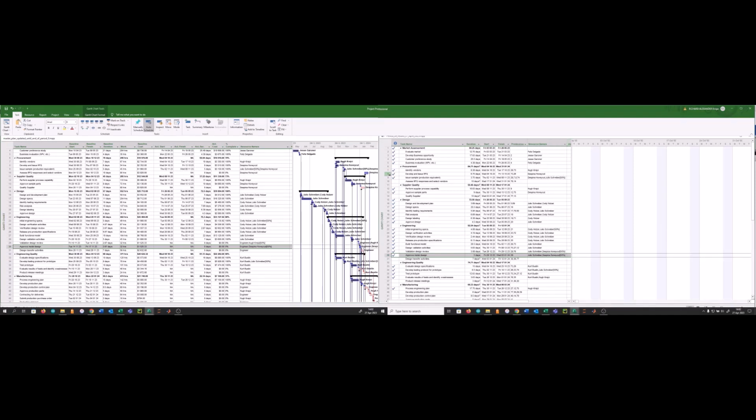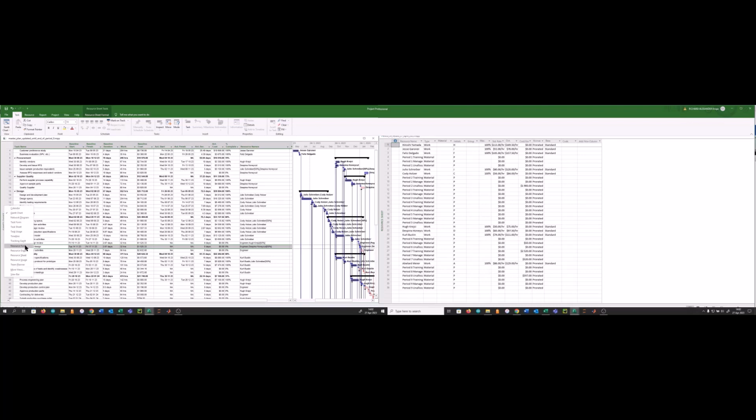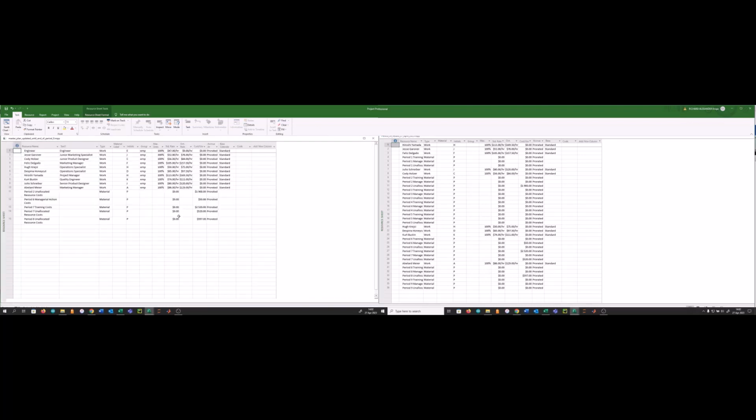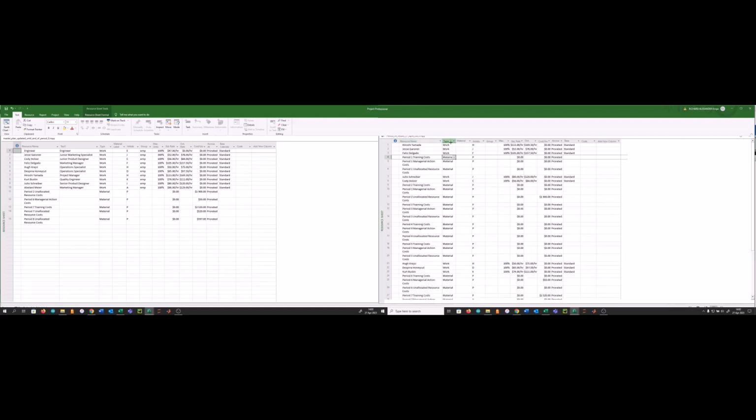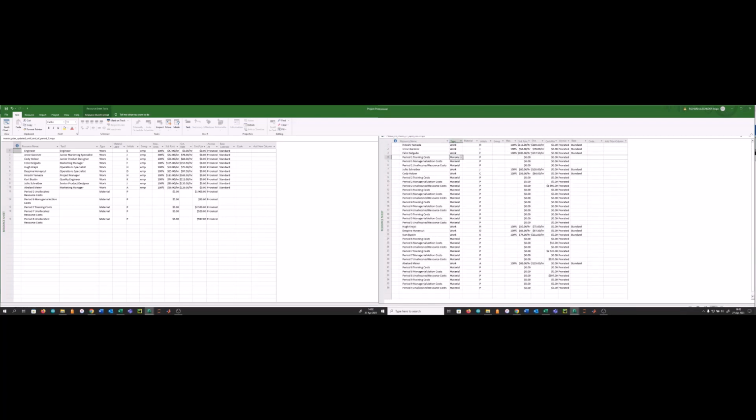So very important, before we do this, we actually need to update the resources that we used for these tasks in period 9, because it might have changed obviously because we chose new resources. We purchased new resources, hired new resources. So basically that's the first thing you want to do. Just see if anything is updated in this file. So as you can see, there are these training costs, managerial costs, and so on for period 9. But as you can see, they're all zero. So if we add them, it's not going to make a difference. So we don't need to add those. And then only the new resources we also need to add.